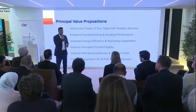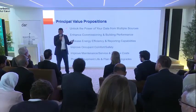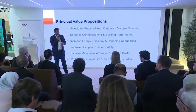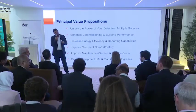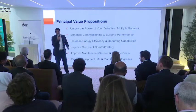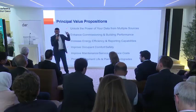And that's an important distinction, because sometimes there's a thought process that, well, my building is only 2 years old. Why would I need analytics? Well, even in the commissioning phase, you can deploy analytics, because for a building that's 200,000, 300,000 square feet, you have systems that are closer to the human beings, right? We call it the terminal units. There are tons of them in any building. And with commissioning, which is data-driven, you can achieve about 70 to 80% reduction in labor when it comes to making sure that equipment is working properly, things that are not right or issues are surfaced very quickly for someone to action.